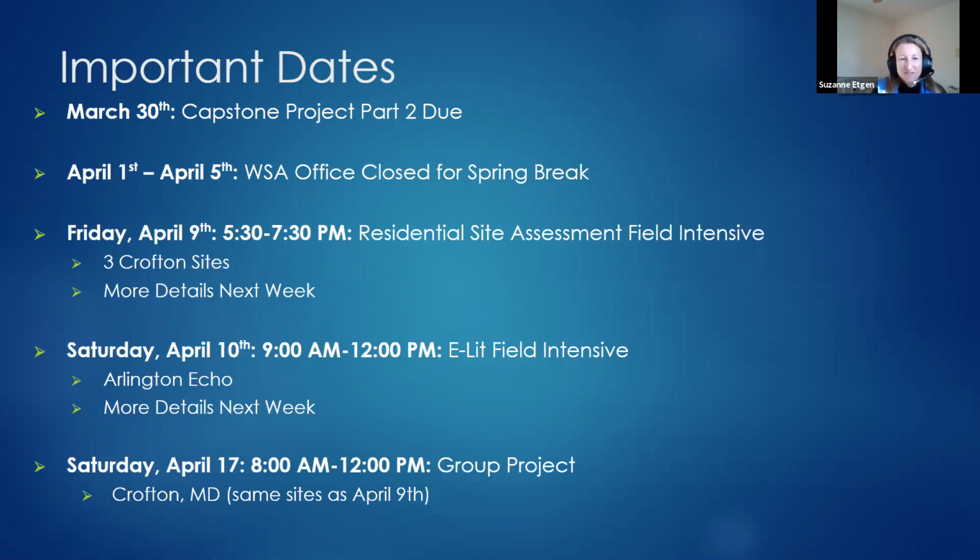On the 17th, if we have a torrential rainstorm, for sediment and erosion control reasons, we will have to reschedule that. So we'll just have to play that by ear. It also is not so great to be digging and tromping around in soil that is wet because it causes compaction. We'll give you as much heads up as we know. We'll be watching the weather.